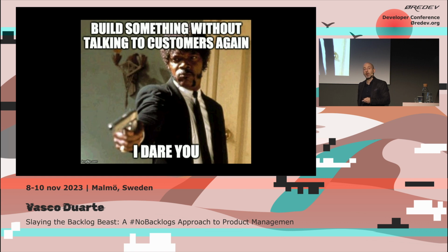Why? Because when you have to coordinate more people, you get less stuff done. When you only get feedback every 3 weeks, you get a limited amount of feedback, but now you need to deliver that feedback to a lot more people. That means there's a lot less feedback per person in the team being delivered. If you think about this for a second, you start to do a little bit of math and show that actually for the average team member, feedback has gone near 0.